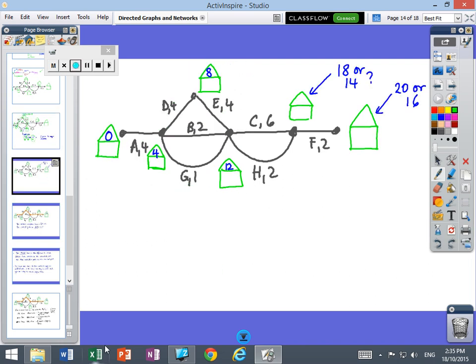So we're back on, and now we're at this next junction. At this junction, we're at 12 minutes. So we've got 2 options: a 2-minute activity or a 6-minute activity. So 12 plus 2 is 14, or 12 plus 6 is 18. Which number are we going to choose? We have to choose the larger.